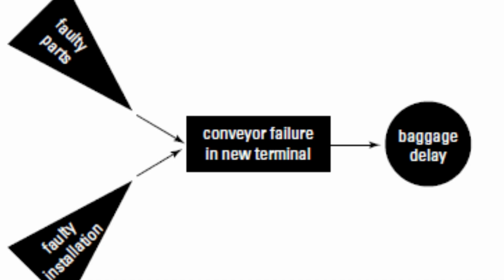What is the cause? You're going to lose a very important staff. What is the event? Once that staff is gone, the production of other project deliverables are going to go for low quality. Then what is the implication? The customer or the end user is going to be unhappy. So as a project manager, you should be very clear on how to define what is a risk. A risk is not just an end statement. I've seen so many project managers making that mistake. It must have a cause, event, and effect. So I'm going to take you through how do you represent these three items. So the triangle, for example, is what is used to represent a cause.